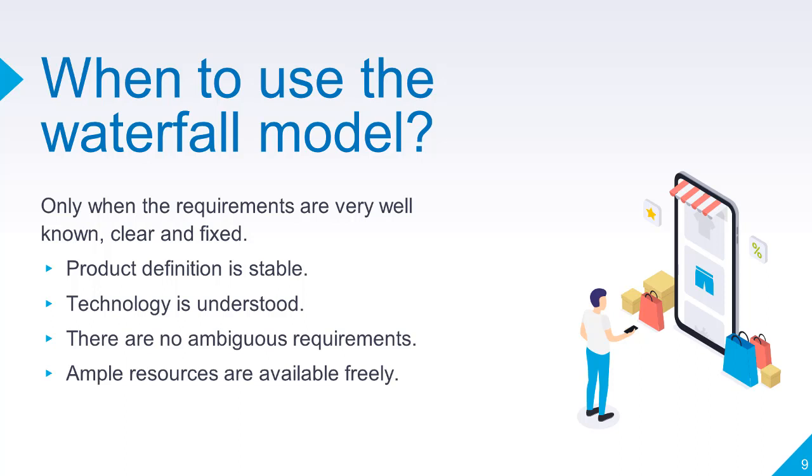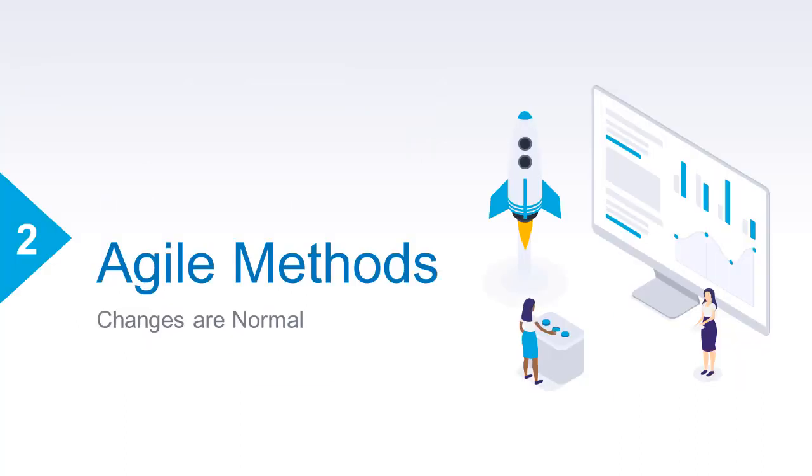In today's world, the waterfall model has been replaced by other models like iterative agile methods. With agile, the idea is to move from the concept that changes are an exception, a problem, a failure in requirement specification, to changes are normal. This requires breaking up the project deliverables into small chunks with fast turnaround times, like days or weeks, often called sprints, and not months. Each deliverable is a final product, not a draft, prototype, or model, although they are expected to be revised or redone during future cycles. The overarching concept is that it's never too late to make changes by reshaping the next development cycle.